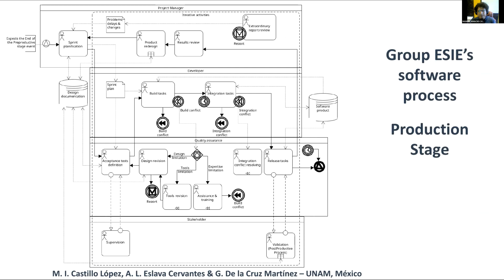Whether there are any exceptions or not, the product design is checked to verify if the current build complies with stakeholder needs and expectations so far. All these tasks occur in a few hours before the iteration, until the final product is built. At the end of each iteration, depending on agreements, stakeholders or their representatives can validate the build.